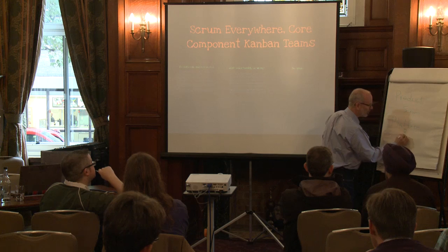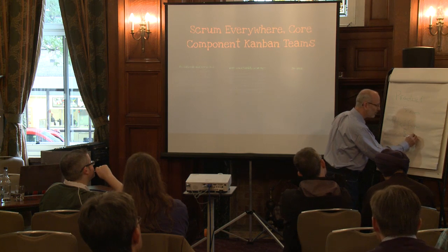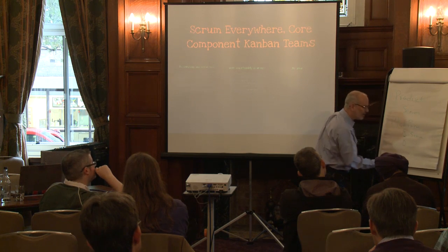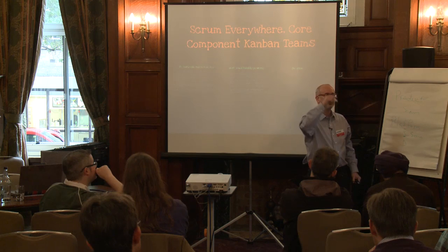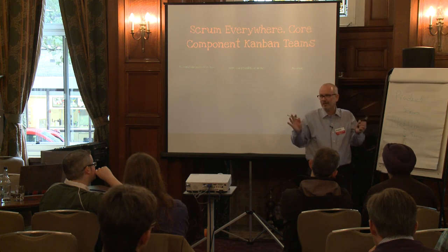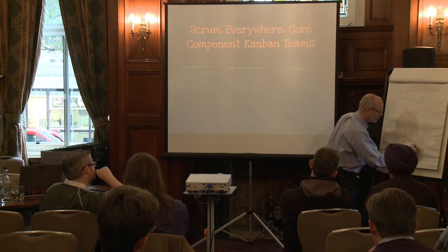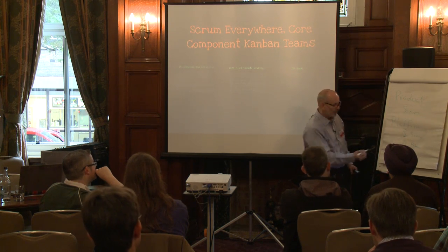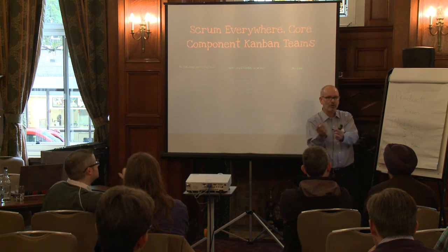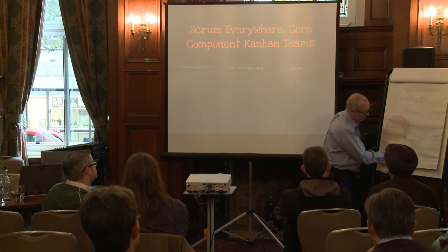Okay? On the research side, the R team or teams, these guys need to be iterative, so they typically will use something like Scrum. The development teams, the guys that know how to use the platform that they put together, that everybody else on the product teams is kind of leery about, these guys don't use Scrum, they actually use a Kanban, and I'll explain how that happens. These guys need a team for communication internally, to help one another understand the vagaries of the architecture and the application of doing things, right?